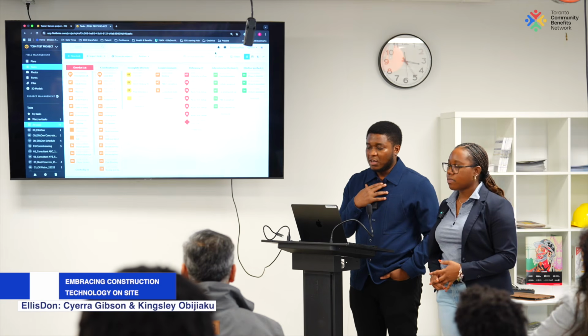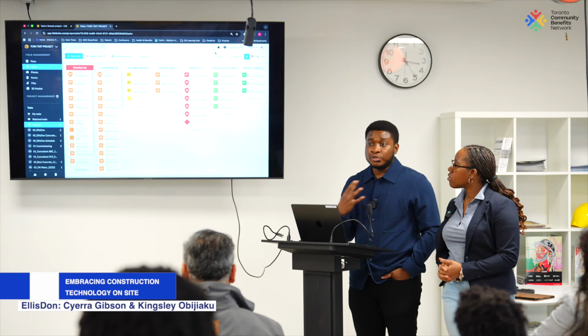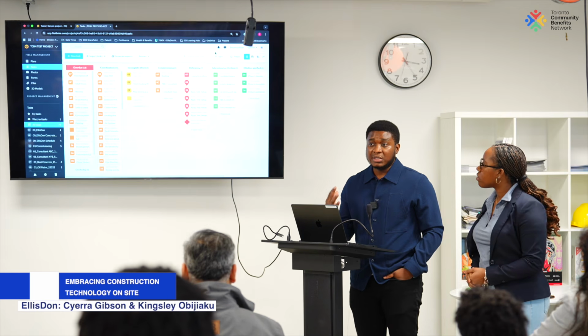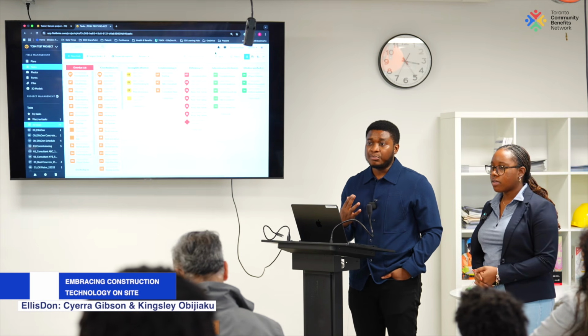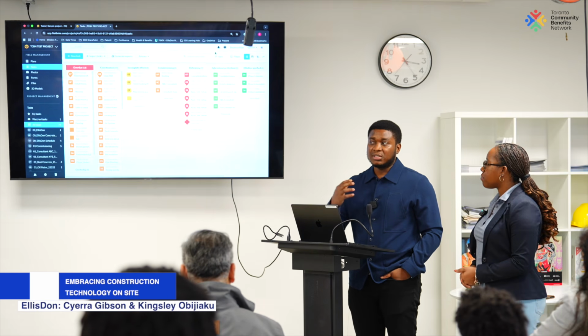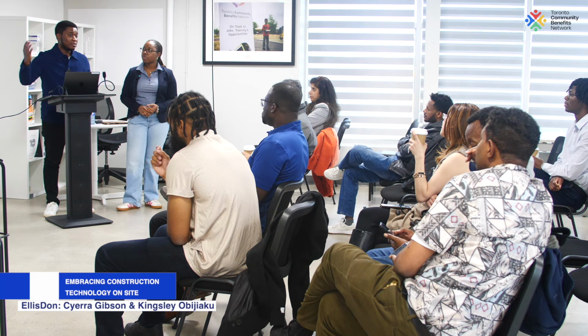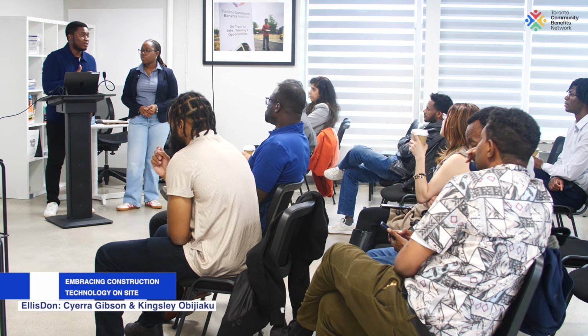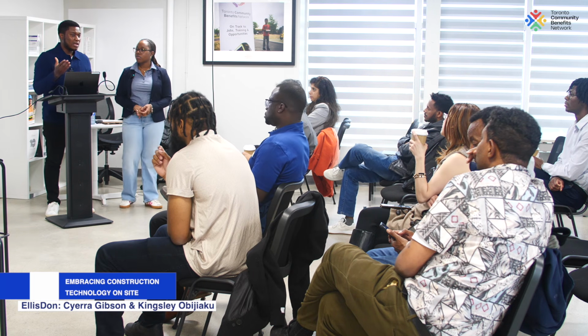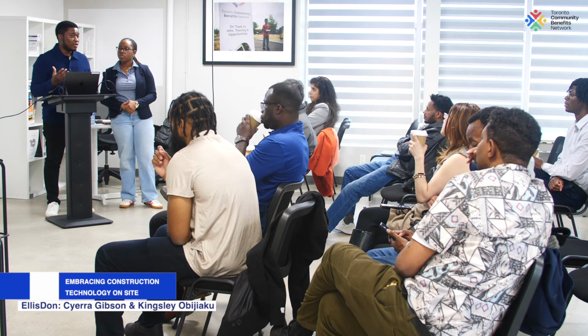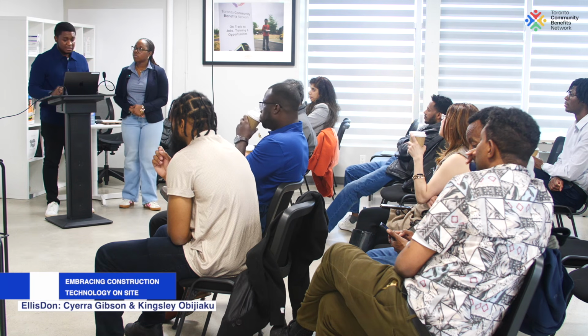So we have different levels of access, but what I as a PM would want to know is how many doors have been completed in the last week, for example. I want to run reports. I want to see how much I'm billing the owner. So if you don't input your information correctly, you also don't get paid accurately, right? So it's always important to do stuff like this.